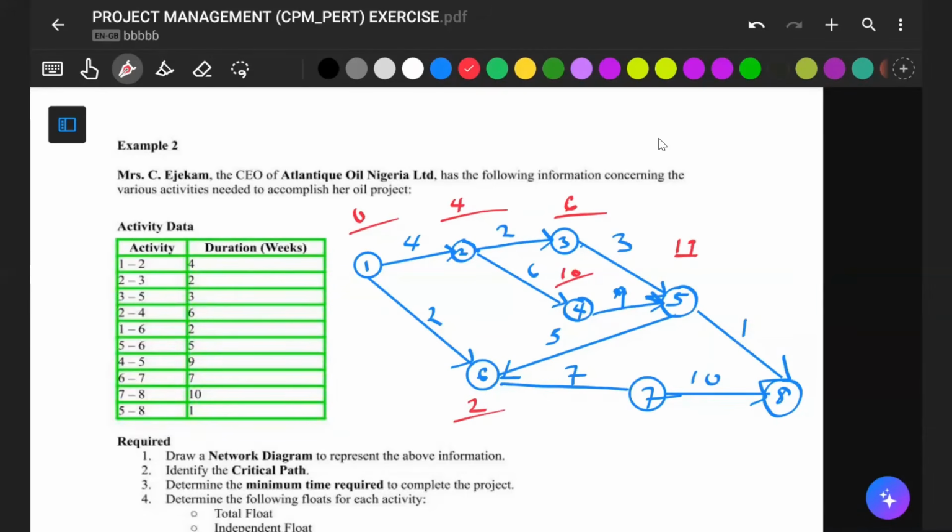24. If that is the case, we can't use this here, because if you realize we have 2 arrows coming to 6, and we said the bigger one is what you pick. So here will be 24. All right, so if this is 24, we have 24 plus 7.